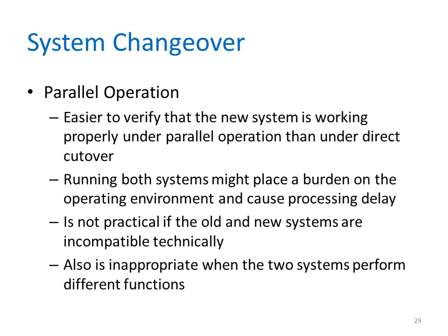The most obvious advantage of parallel conversion is the lower risk. However, it does have some disadvantages. First, it's the most costly of all the changeover methods. Because the old and the new systems are in full operation, the company pays for both systems during the parallel period.